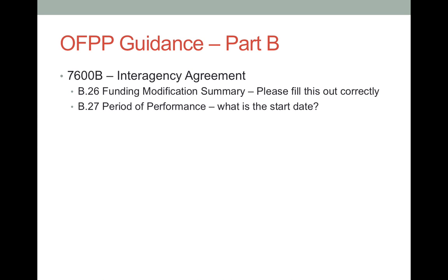Since the requesting agency cannot demand consideration for failing to satisfy the requirements within the period of performance, this field is more for tracking than a contractual obligation. The schedule in the statement of work is much more visible to the performers, where more effort should be expended.